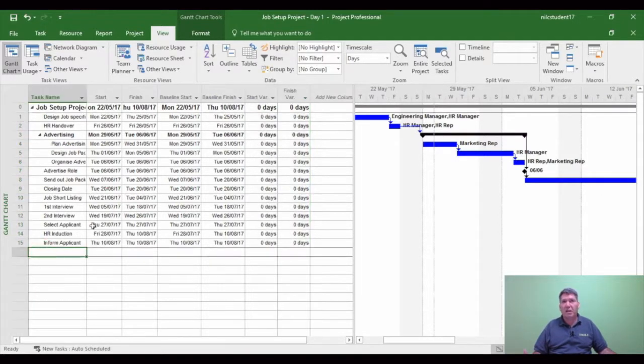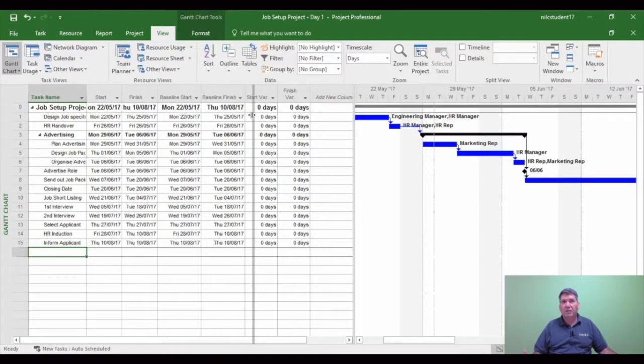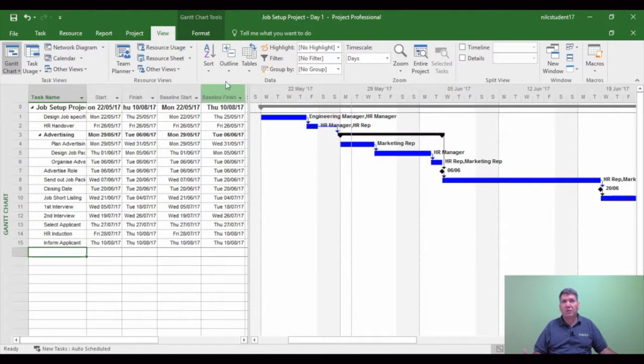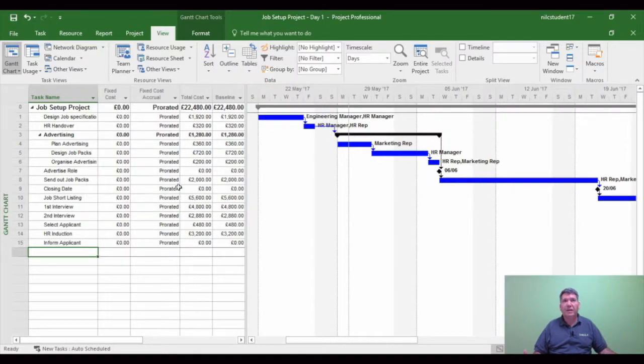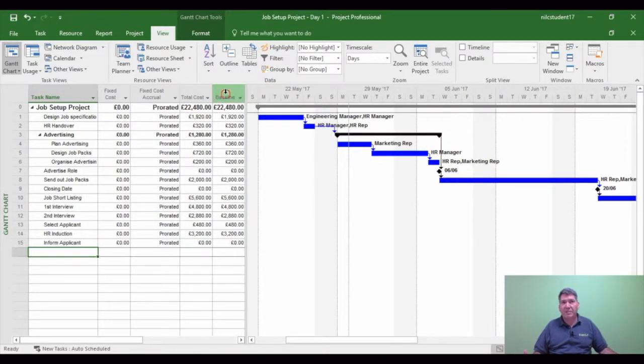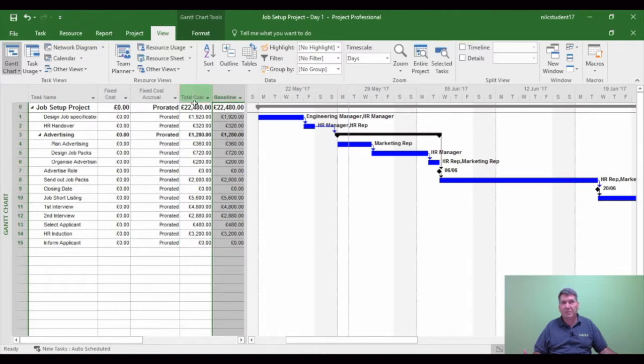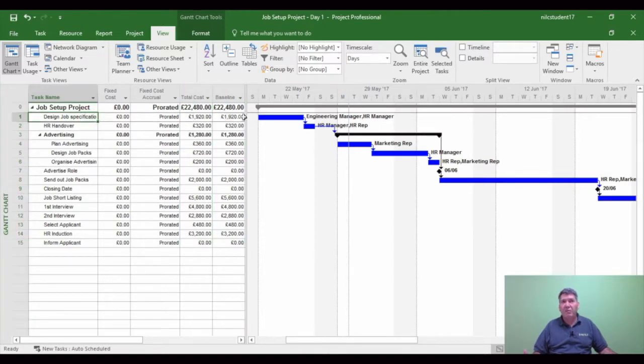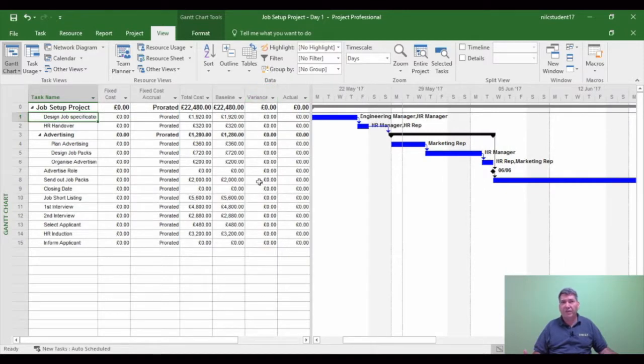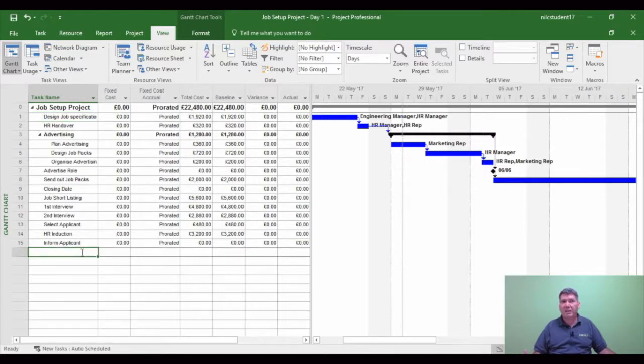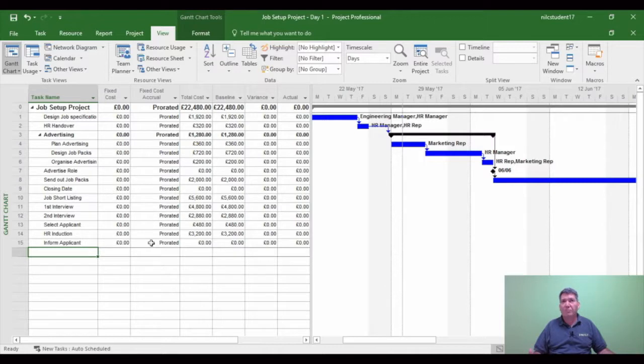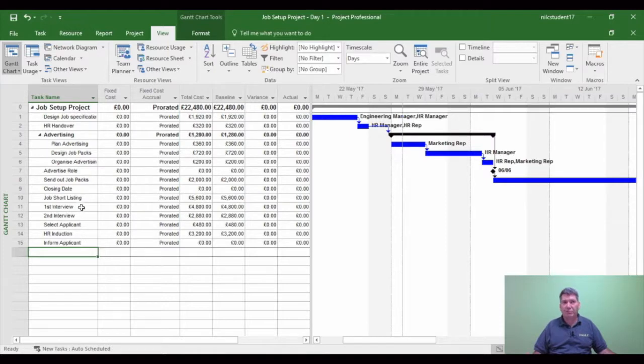Now let's look at the cost table. Let's see what's happening in the cost. So now hide some columns. Come back to my cost table. Now the cost table, the baseline has been set. And there's the baseline. It's been set against the total cost. If I now look at my variance, there is no variance. So whenever the project is now updated and extra costs are put into the project, there will then be a variance from the baseline. So when you've set a baseline, it's going to give you a clear picture of what's happened and changed within your project. It's a very useful tool within Microsoft Project.